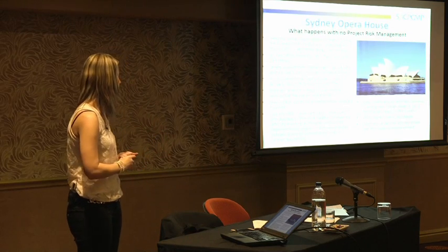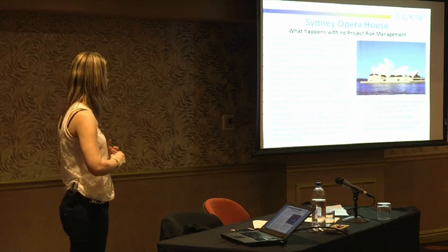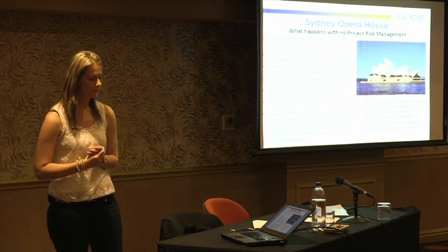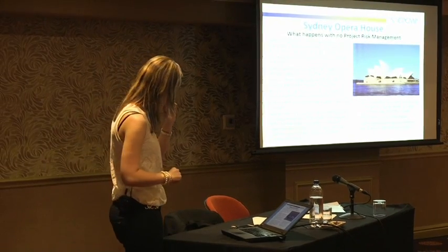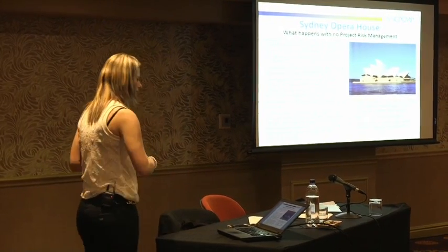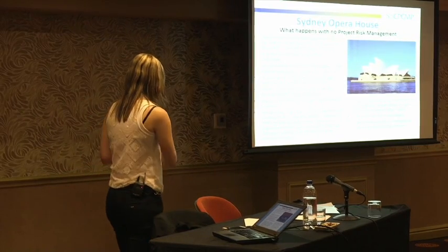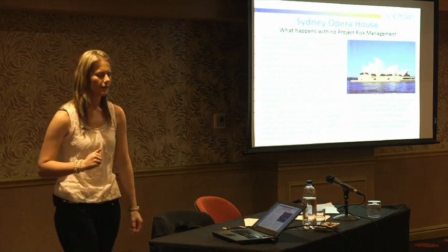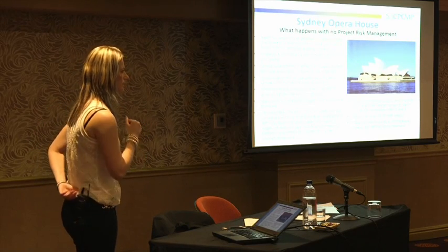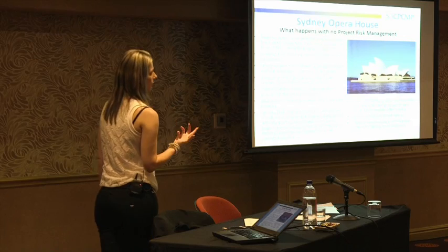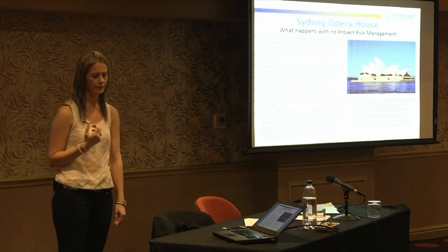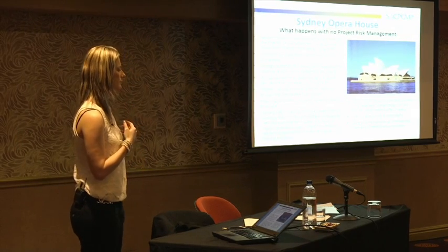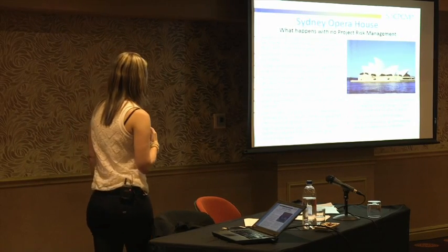And that's one of the things the Sydney Opera House did as well. They started construction before the plans were finalized and before they saw the entire picture of what the Sydney Opera House should look like. So basically, in 1961, only 2 years after they started, the project was already behind by 47 weeks. So in 2 years, you've lost a year, but more than a year, which is quite shocking statistics if you think that they have overrun on schedule basically by 100% already.